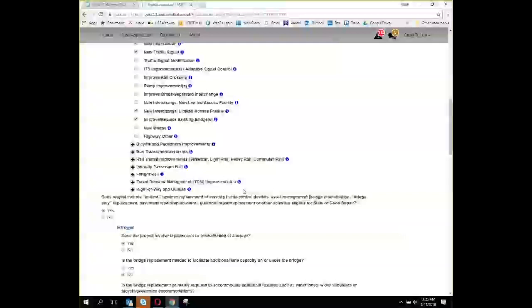If you requested pre-screening, a workflow gets triggered on our end to assess: does the project meet a VTrans need? Is the project eligible, and is the project ready? We'll do our best to give you a fairly quick turnaround, 2 weeks.